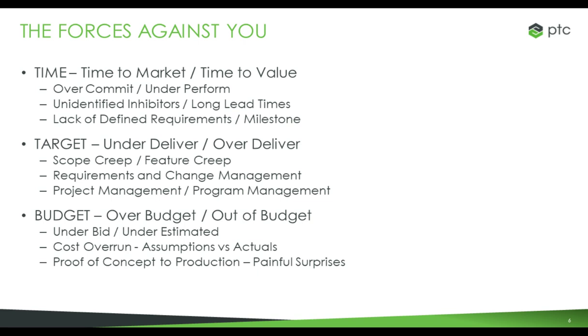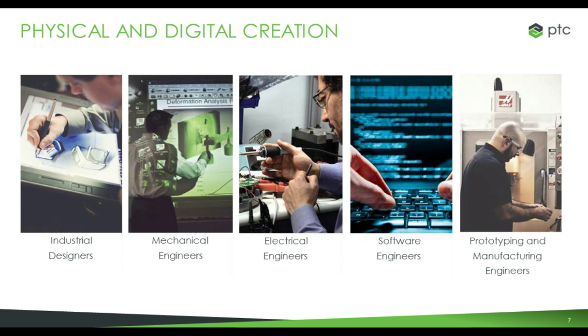Cost overruns in one area of a project can be mitigated by either reducing a deliverable or reducing a feature or a function and adding that into a roadmap versus a deliverable at the beginning of a project or at the beginning of the launch.